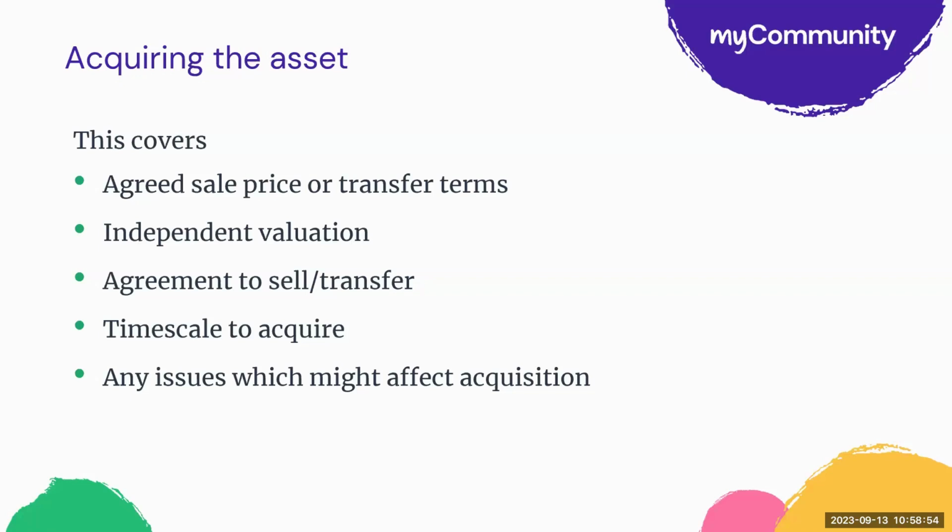Important to be able to say how long it's going to take and to note any issues which might affect acquisition, like we have to get planning permission before we can complete the sale, or there are covenants on the building which we need to explore further before we can agree to purchase or acquire.